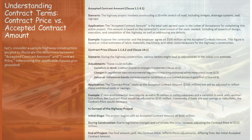Imagine a sprawling 20-mile highway — a backbone of commerce and connectivity, stretching across scenic landscapes. This highway isn't just a path of asphalt; it's a complex orchestration of planning, design, and execution. At the heart of this orchestration lies a contract, a blueprint of promises and expectations. Our journey begins with the accepted contract amount: after rounds of negotiations and assessments, the contractor and the employer shake hands on $100 million.